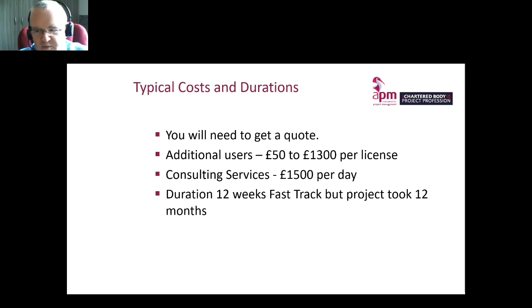Unlike Network Rail, we didn't go for the big bang approach. This was basically driven due to the lack of appetite for risk and uncertainty and change, as you can imagine you've got in the nuclear industry. So we split the implementation into 3 phases, although phase 2 and 3 were eventually combined.